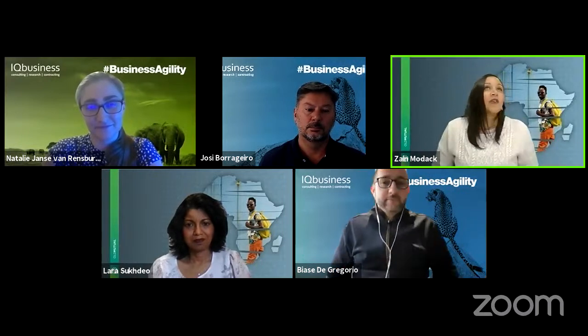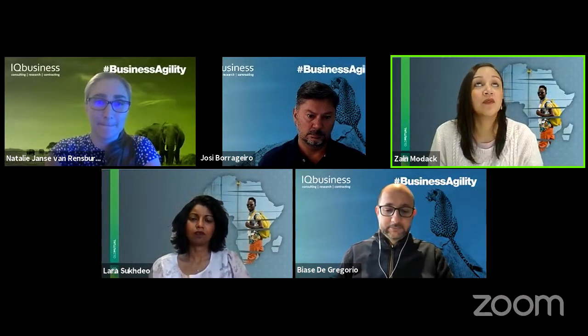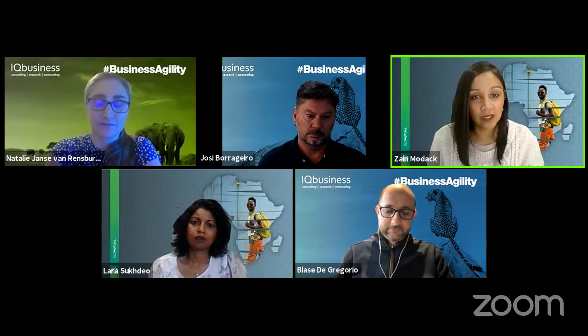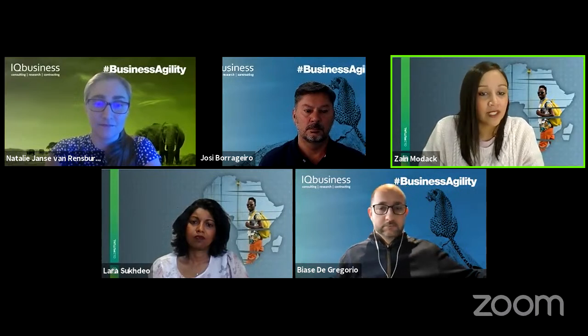Zane? So how we started, like I said, we started with setting up our teams. We focused at that team level, and we very quickly realized that these teams need to work together. There are so many dependencies across these teams. And so how do they all plan together? So we introduced the concept of an agile release train, but across our portfolio of change. Everybody comes together now on a quarterly basis and plans together for the next quarter. That's what we started with.